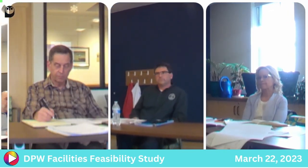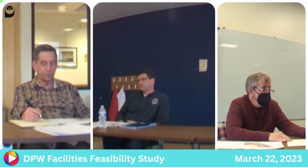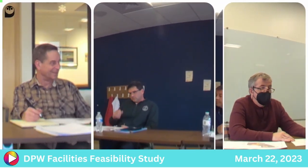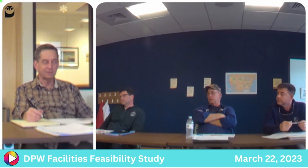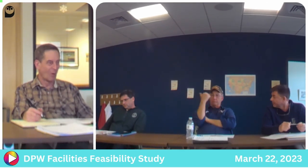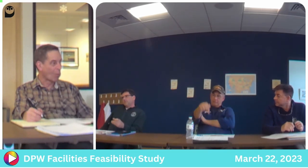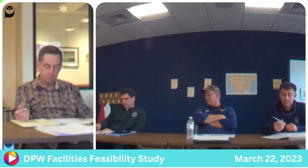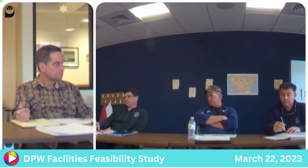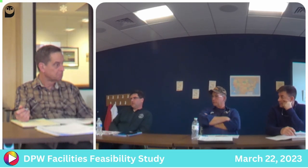Okay. And when you do camera a sewer pipe, does it take a video that's savable? Yes. Oh yeah, you'd be surprised what it looks like. They give you a stick with everything on it, they will tell you how deep it is, what's in the way. They're amazing. With Fletcher's, we cameraed the good one to figure out where to tie the stuff in, and they will tell you where it turns, how deep it is, and they're within an inch. If we open that manhole over here, that existing outfall catch basin, and look in there, it's corrugated pipe, which I'm pretty certain it is.